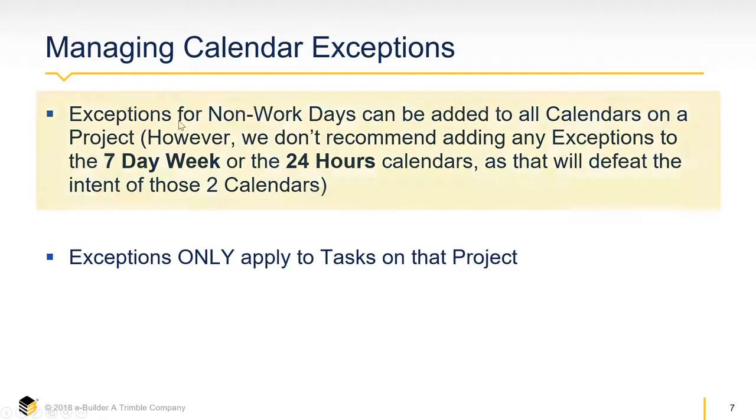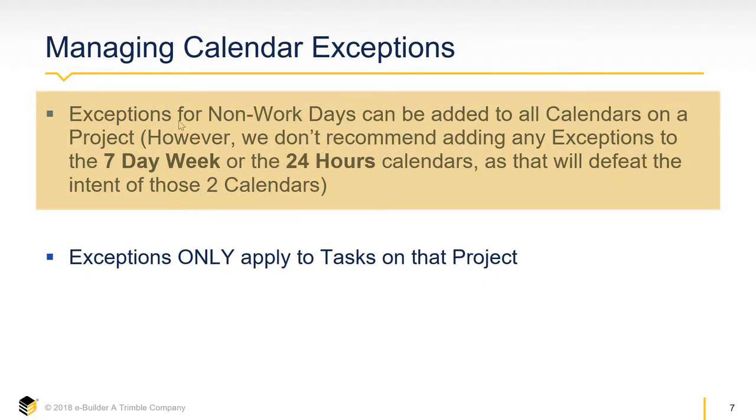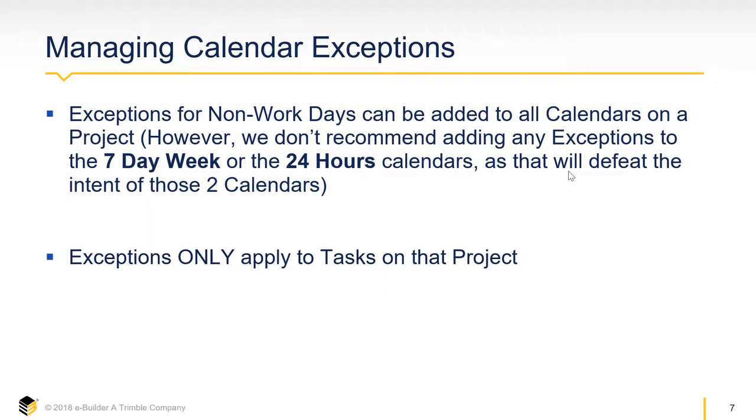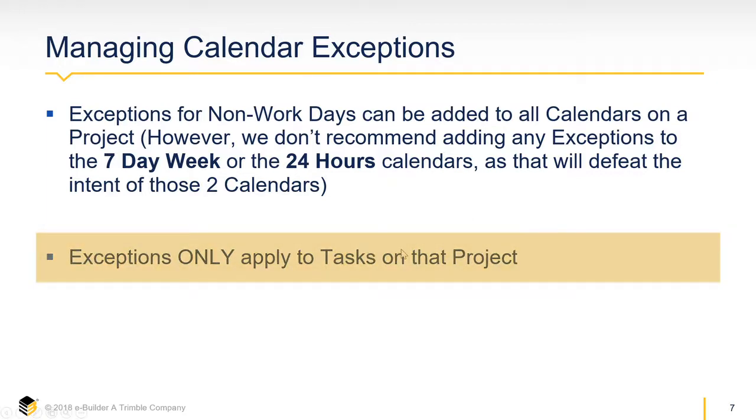You can create non-workday exception days on any calendar, but we wanted to caution you against adding exceptions to the predefined 7-day week or the 24-hour calendars because that defeats the intent of those 2 calendars. But any other calendar, you can add exceptions. Most companies will be putting their company holidays on their standard calendar, for instance. And once you have exceptions on your project's schedule calendar, they only apply to tasks on that project.